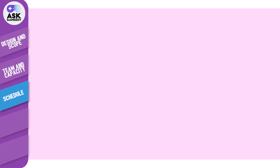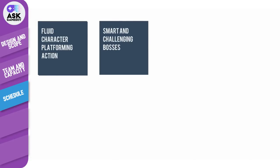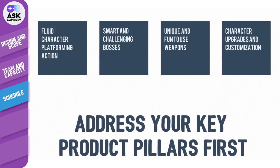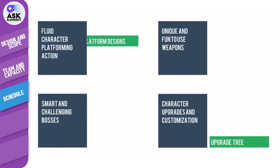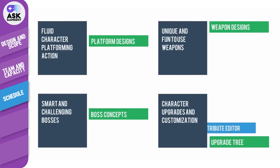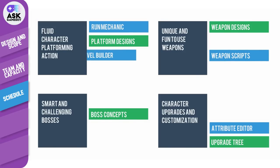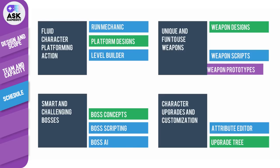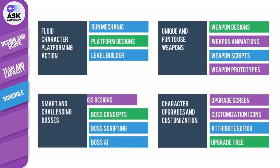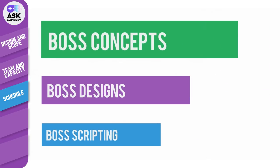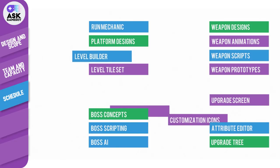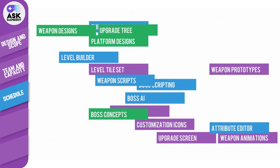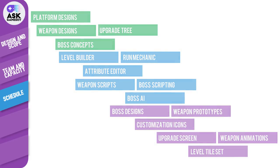In terms of features, there is no hard rule regarding what order to use for execution, but it is generally accepted that you will want to address the key product pillars first, with specific focus on proving out any pipelines or tool sets needed for when your team ramps to full staffing. The schedule is a critical step — you may have tasks with dependencies that could cause key dates to be missed. These situations can be common when dependent on delivery from external partners, and you may need to shuffle the order of operations, add additional capacity, or reduce scope.